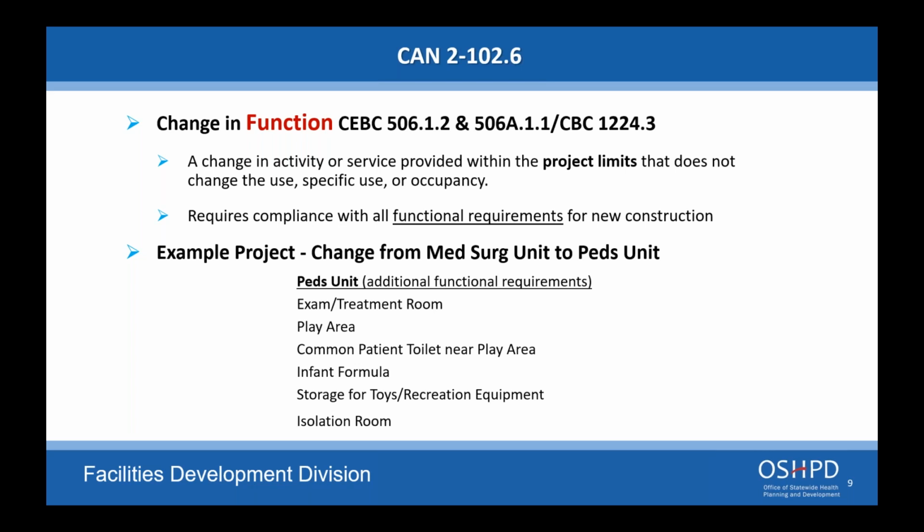But you're going to probably have soil utility, nourishment rooms, clean utility rooms. They're all going to be reused. Identify those in the existing, call them out in the new as the same type of room, and you submit that and just show conformance. It's a very small set. It's usually just a few sheets of drawings that you will be submitting. But again, we don't see a lot of these, so people do get confused when they see them. And so I would definitely call and tell them what you're doing, and you may even get me involved so we can walk through the process.